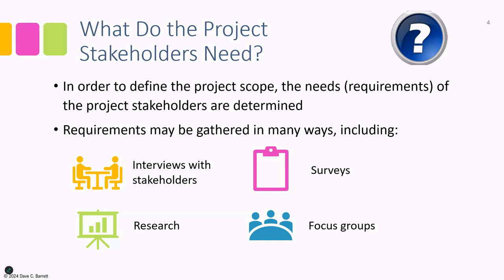Those are situations where a number of representative stakeholders are selected, and then a meeting is held with those selected people, and that's called a focus group. So questions are asked of that subgroup, and that then represents the whole of the larger group.